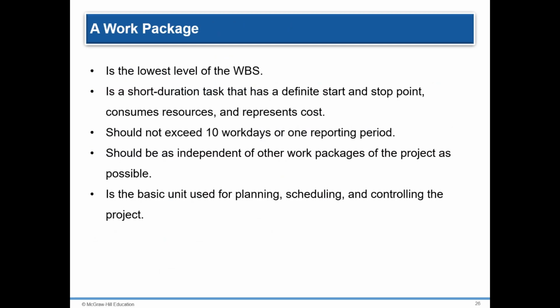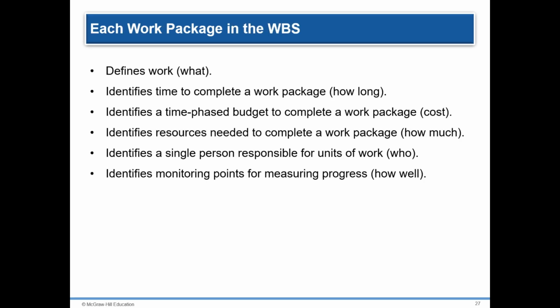A work package is the lowest level of the WBS. Some questions should be asked. It is a short duration task that has a definite start and stop point. It consumes resources and represents cost. It should not exceed 10 working days or 1 reporting period. It should be as independent of other work packages of the project as possible. And it is also the basic unit used for planning, scheduling, and controlling of a project.